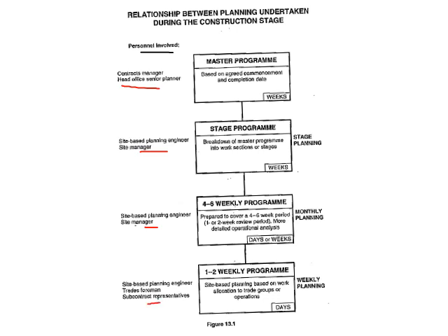It's basically a very straightforward thing of your master program being scrolled down with different levels, where you have your stage program, and then you've got your weekly program, and then your 1 to 2 weekly program.